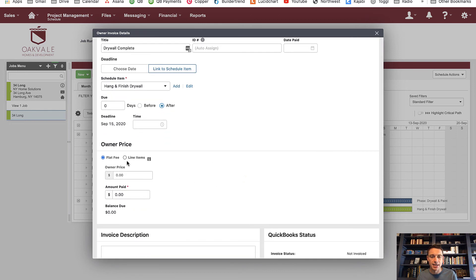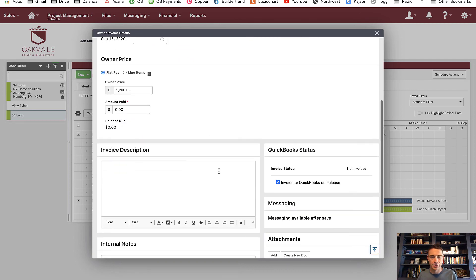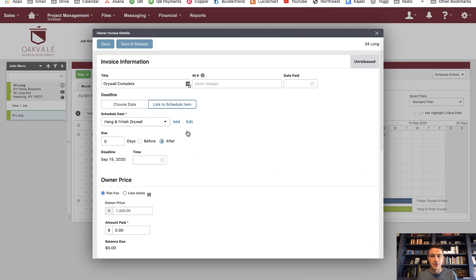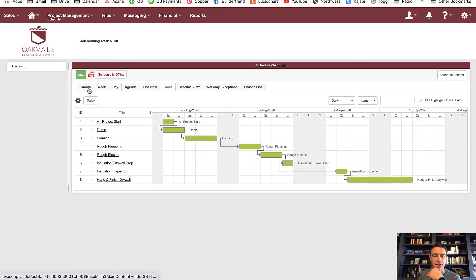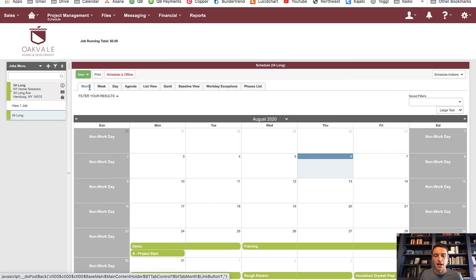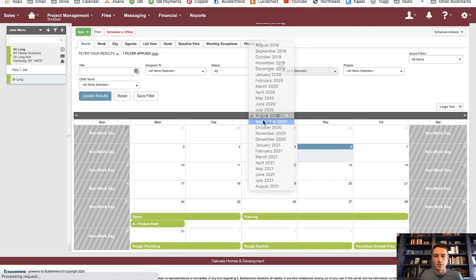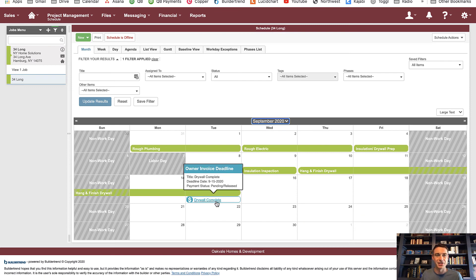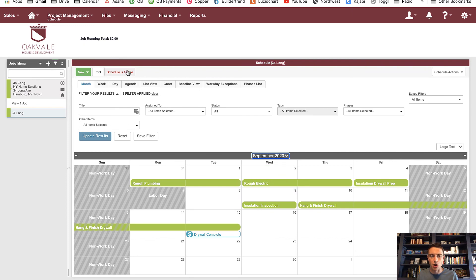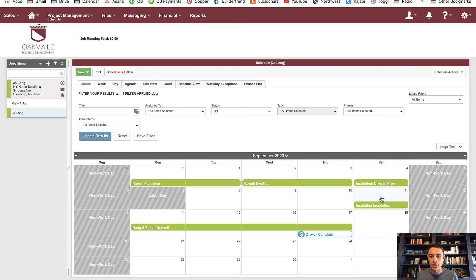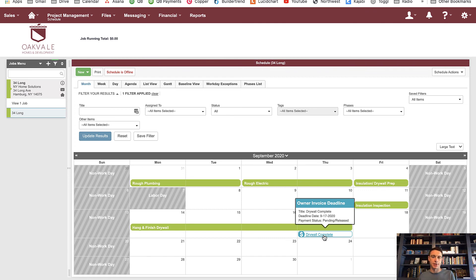I can indicate how much they owe me, link to QuickBooks, save and release the invoice. On my monthly calendar I can actually see those invoices too — not only the schedule of work to be done but also owner invoices. Everything shows up here: selections, change orders, daily logs, all that stuff. And if my insulation inspection pushes out a week, drywall pushes out a week, and that means my invoice gets pushed out a week too — everything is related and linked. The schedule is the anchor.